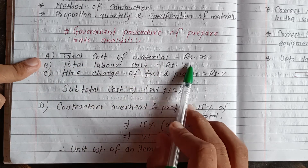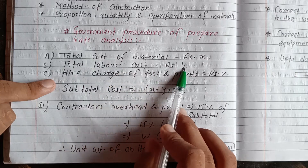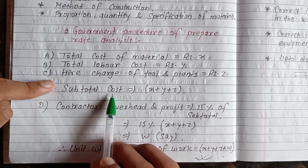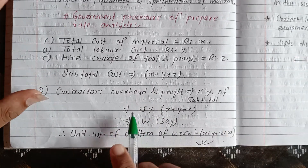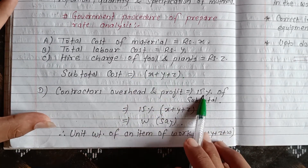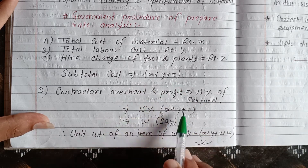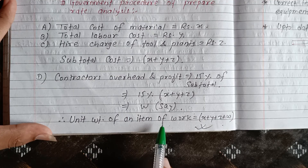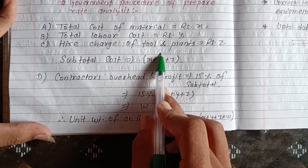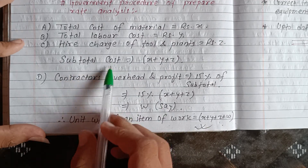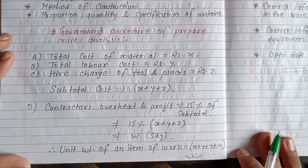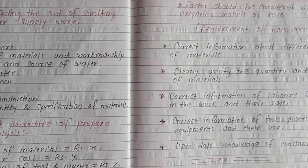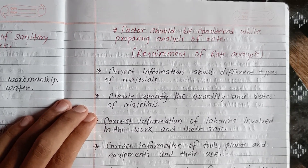The total cost includes: total cost of material (X), total cost of labour (Y), and miscellaneous expenses (Z). The contractor's overhead and profit is fifteen percent of X plus Y plus Z. Therefore the rate of an item of work equals X plus Y plus Z plus overhead and profit — this gives the grand total cost per item.